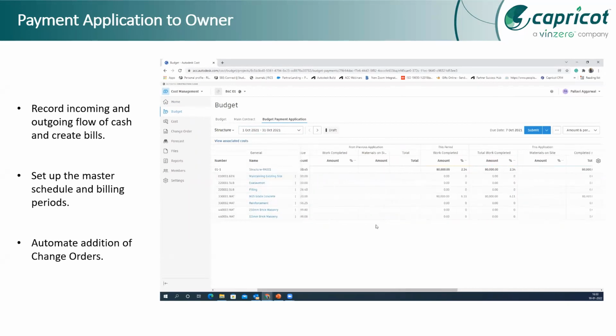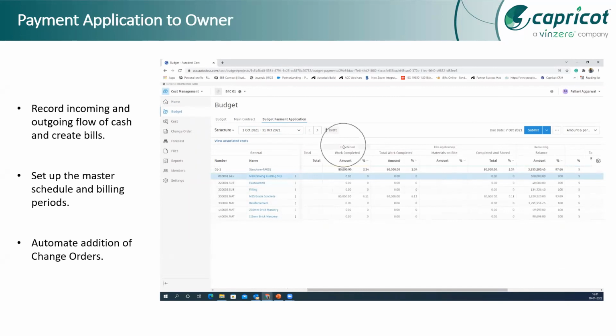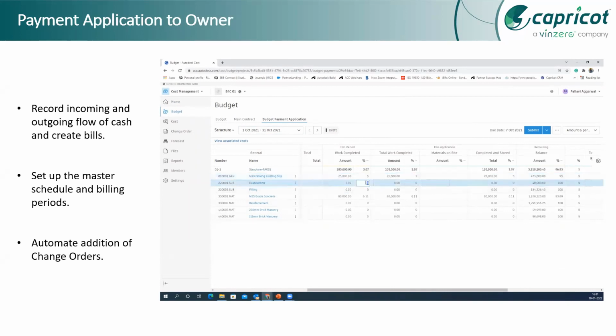They need to specify the quantity, like what all work is completed, how much money they have dispatched to the team members, how much work has been done, and what all cost related to that has been done, in this particular period and the previous period, and then raise a bill to the owner. So they need to notify the owner with all the set of information, attaching information like any change orders which the owners have approved, and they need the cost for that also for the project.